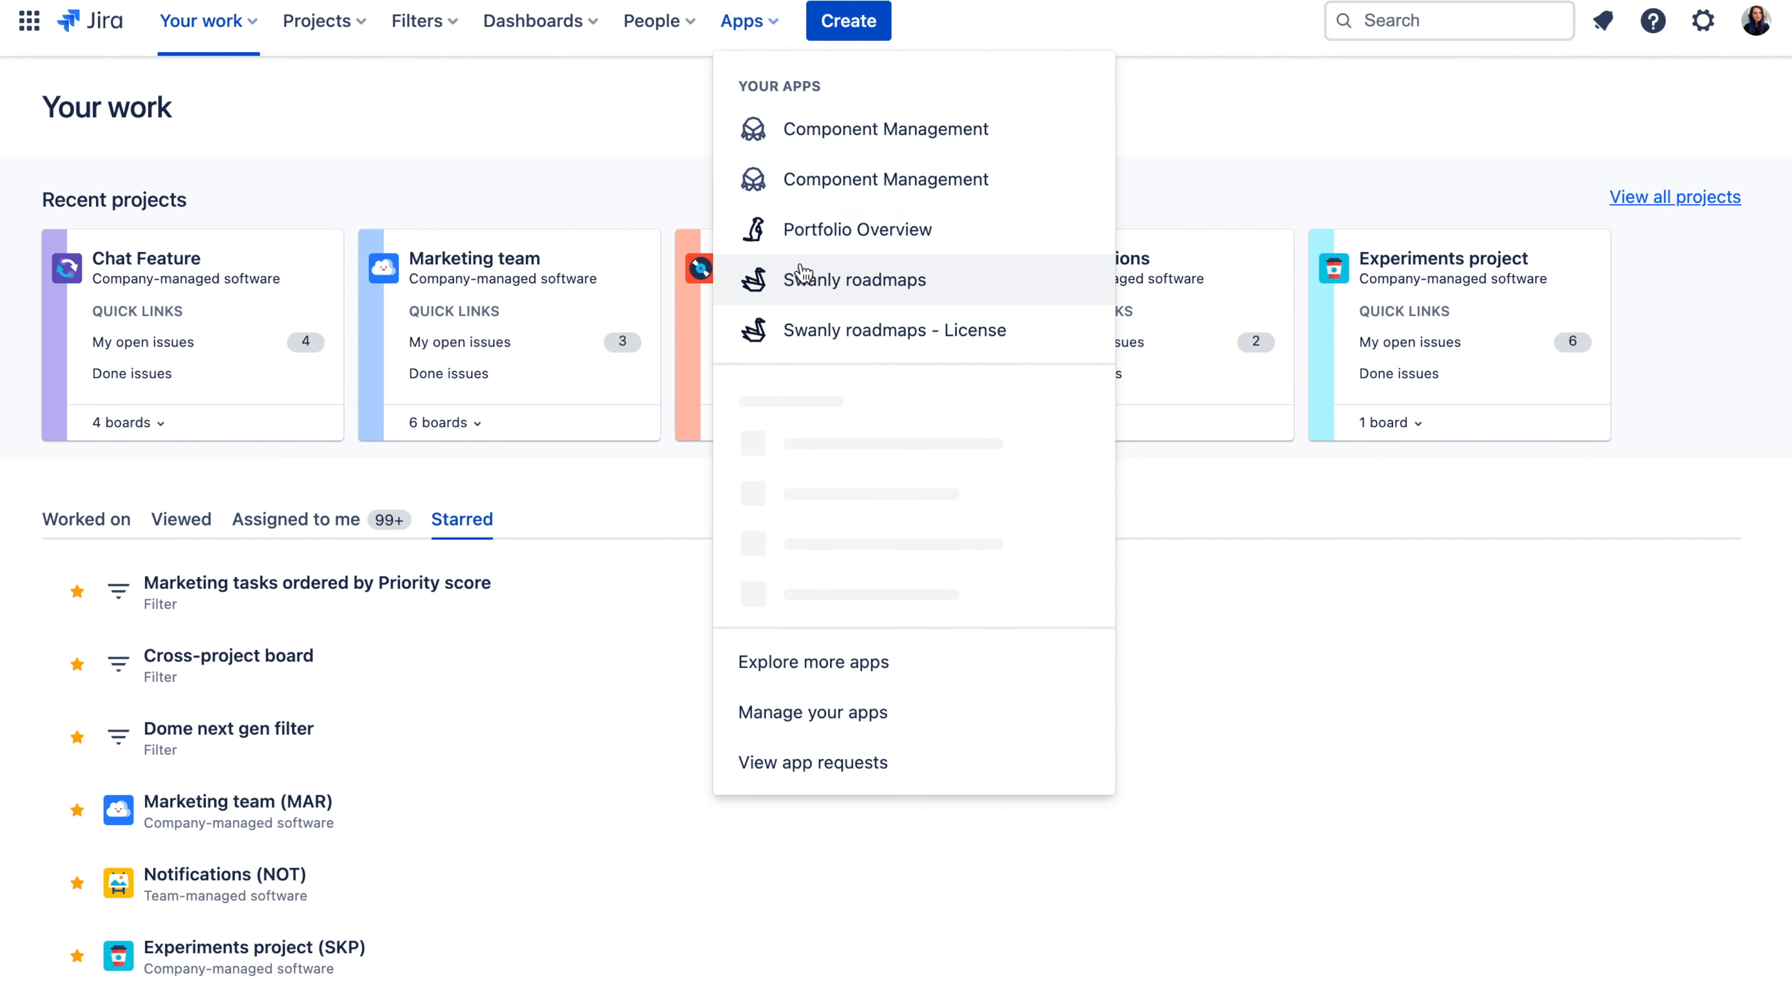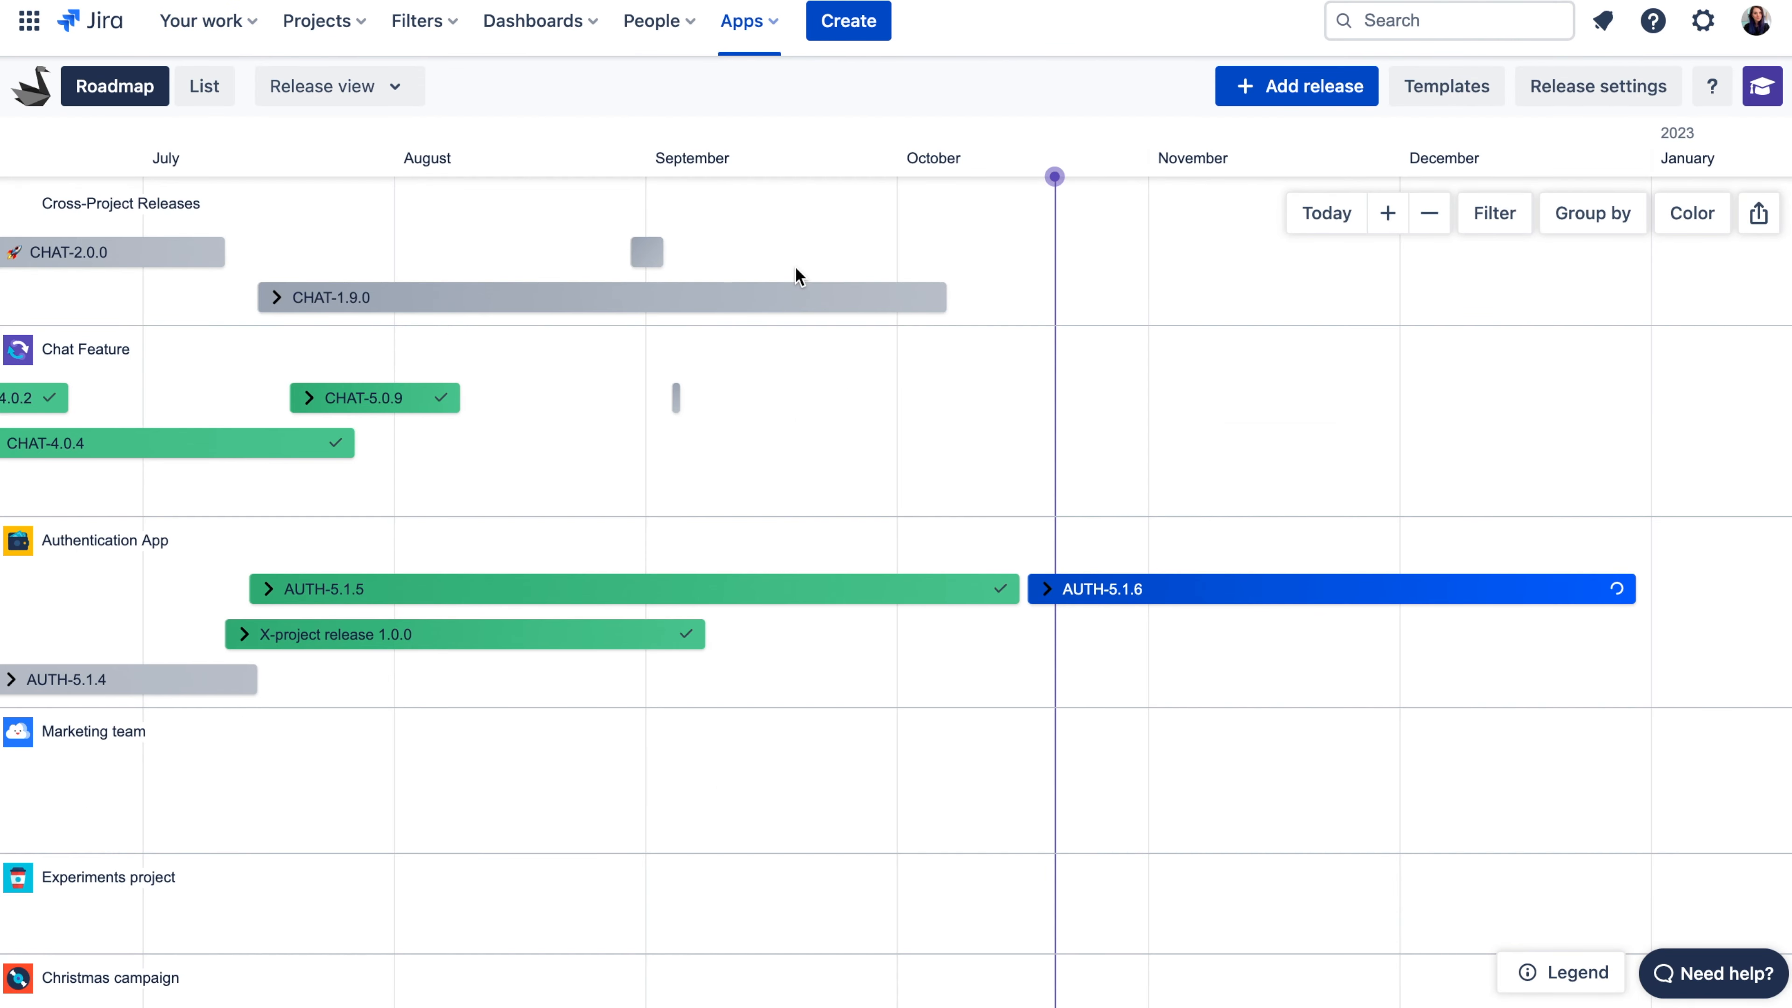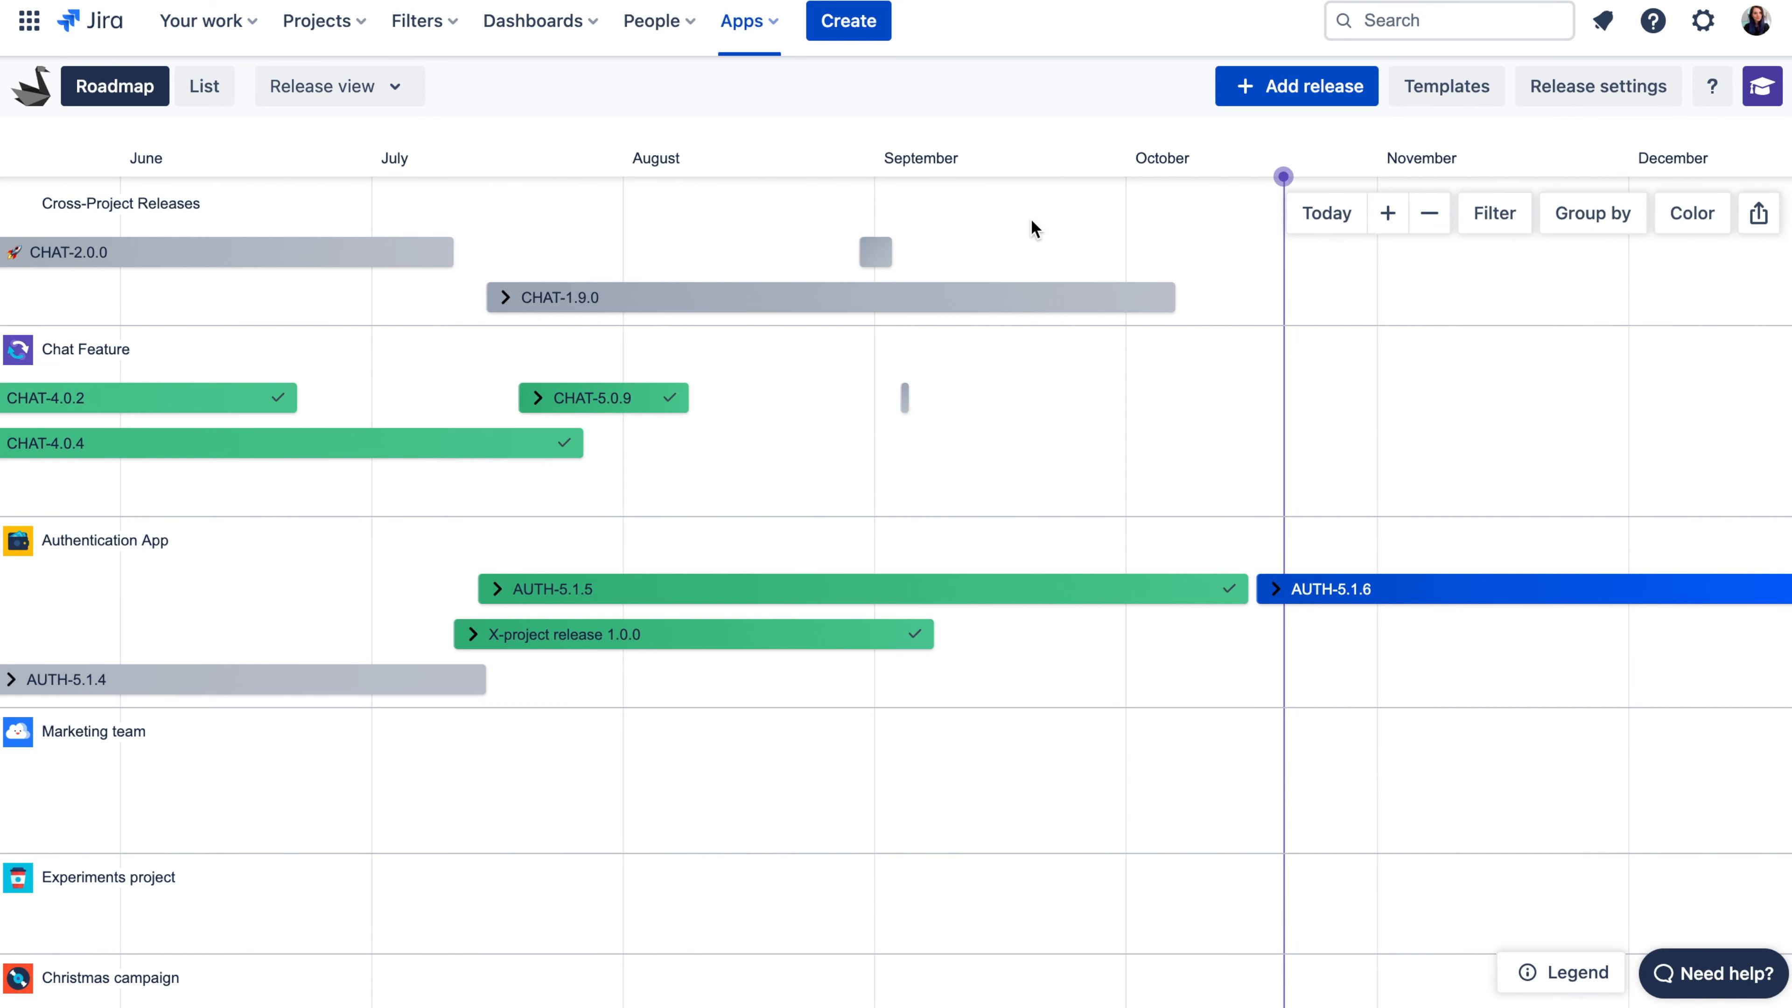To create a release calendar view on top of your fixed versions in Jira, you can use Swonly plugin. Swonly helps you bring releases from different projects into one view. It picks up the start and end dates of your releases in Jira and shows them on the timeline like this.